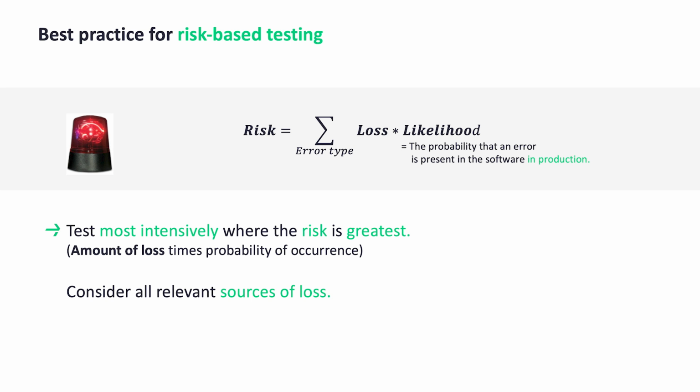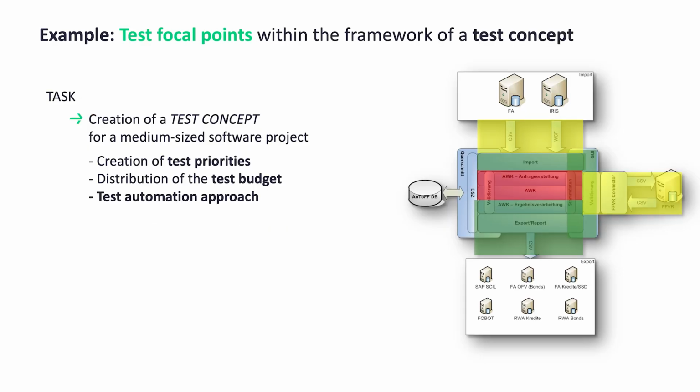where there is a high likelihood of occurrence. But the approach is also helpful as a developer or tester to prioritize different testable aspects against each other. Here too, the two questions, what loss would be caused if a detail to be tested had been implemented incorrectly, and how sure can I be that the detail has been implemented correctly, help to decide whether or how intensively to test an aspect. Two examples illustrate the application of the risk-based testing approach.